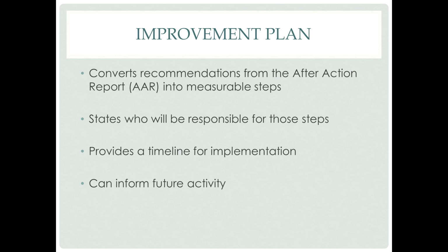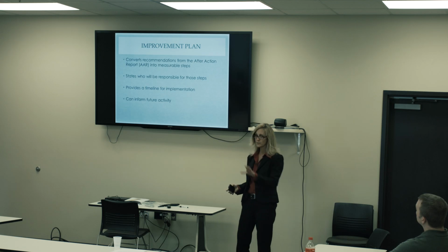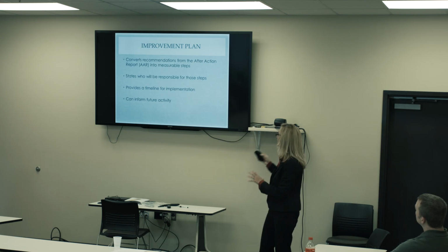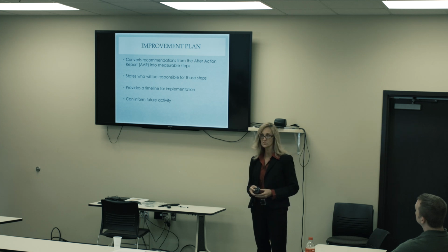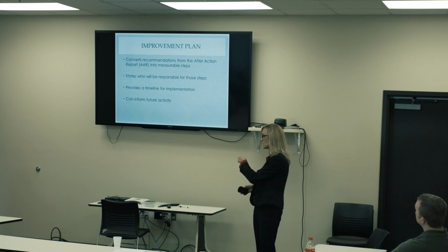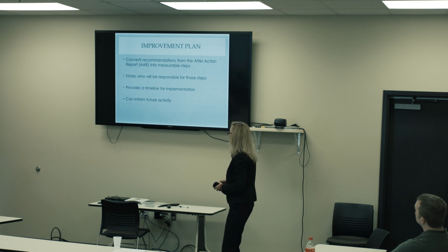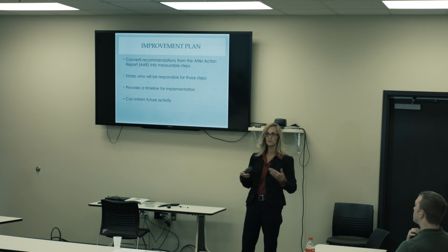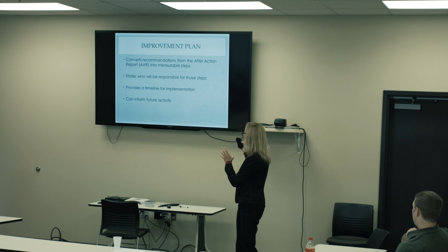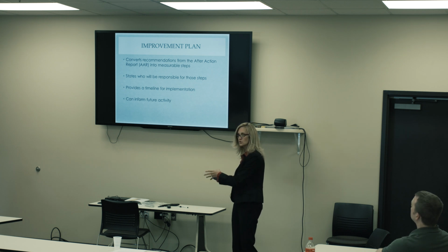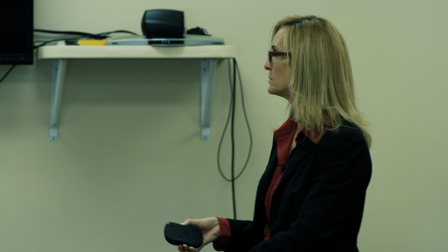So again, I can't encourage strongly enough that for any exercise or real event or incident that you're involved in, you take a look at your improvement plan prior to doing any other exercises and get some information from there about what you can continue to improve upon. Because I've seen so many organizations and coalitions continue to repeat the same problem over and over again because they haven't taken the step to say, let's work on our improvement plan. Let's try to mitigate this gap, and it just kind of repeats itself. So something to keep in mind, the improvement plan is probably the most important part of that after-action process.